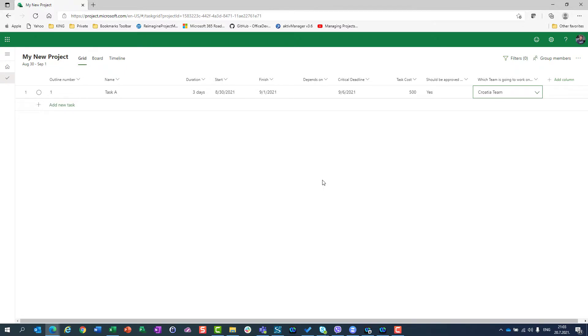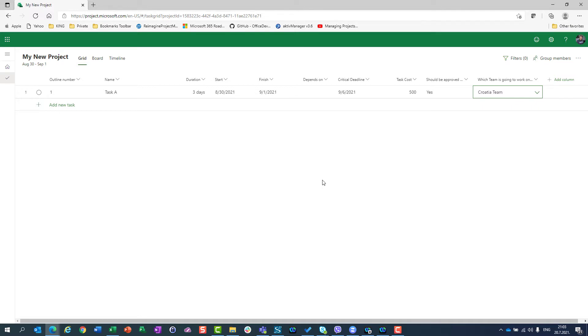But if you need a brand new project with no tasks from which you made a copy, but you need custom fields, then copy your project, select all tasks, delete all tasks, and you'll have a blank project with all custom fields. That's a trick, but a good one.